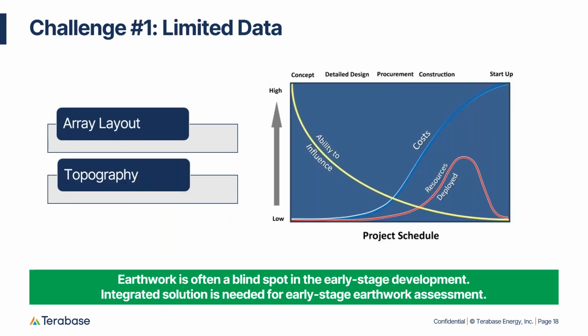Next, please. So it was nice to see that some of you were doing earthwork assessments very early in the project, because that's when you can have the most impact on the project. If you look at the graph there, you have project schedule on the bottom, and you have low to high influence on the project on the left, on the vertical axis.